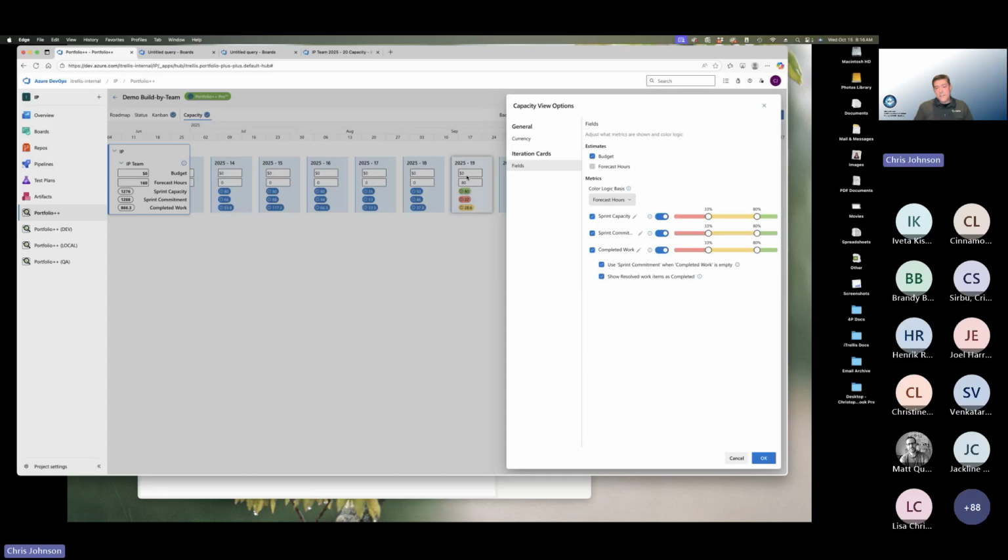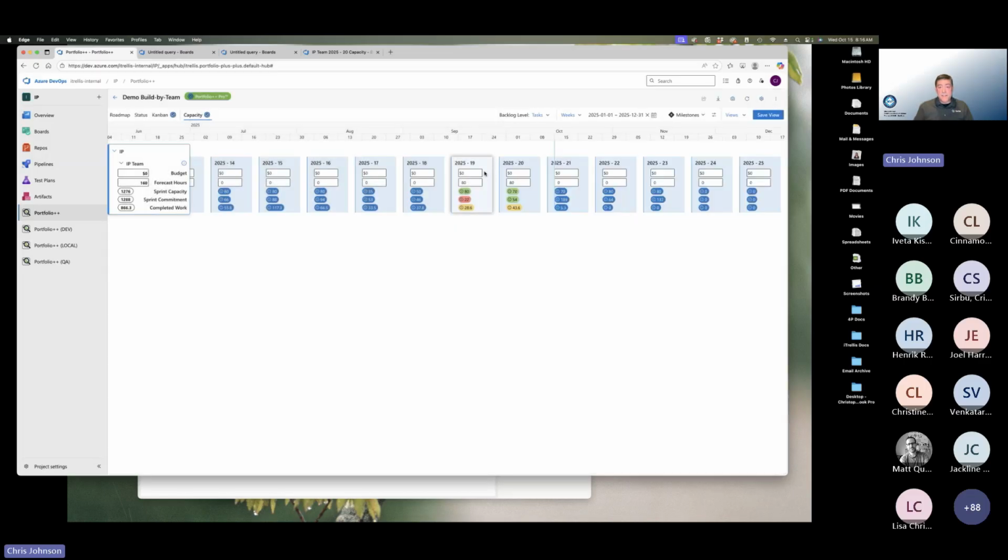The next question is, how much does this cost? And that's entirely up to you. However you choose to budget for a sprint for the team, it's a pretty safe bet that you need to look at the number of people that are involved, the number of hours that they're putting in, and apply some sort of metric, an average hourly rate or a specific cost per person. But at the end of that process, however you choose to do it, this is where you put that budget number for this sprint.